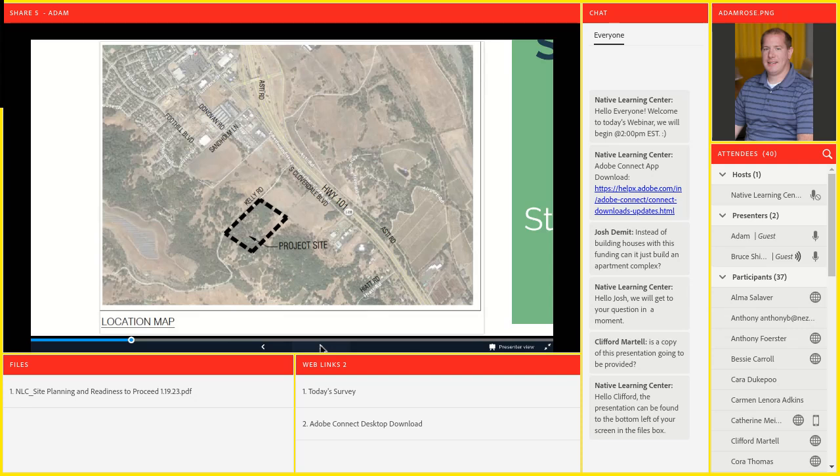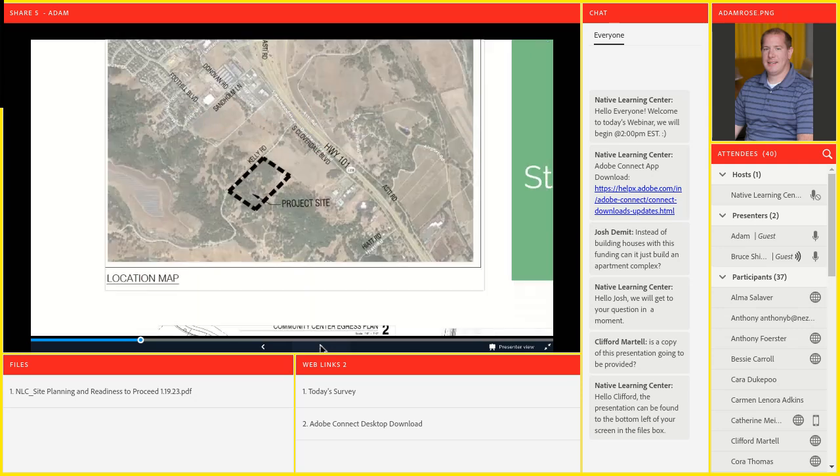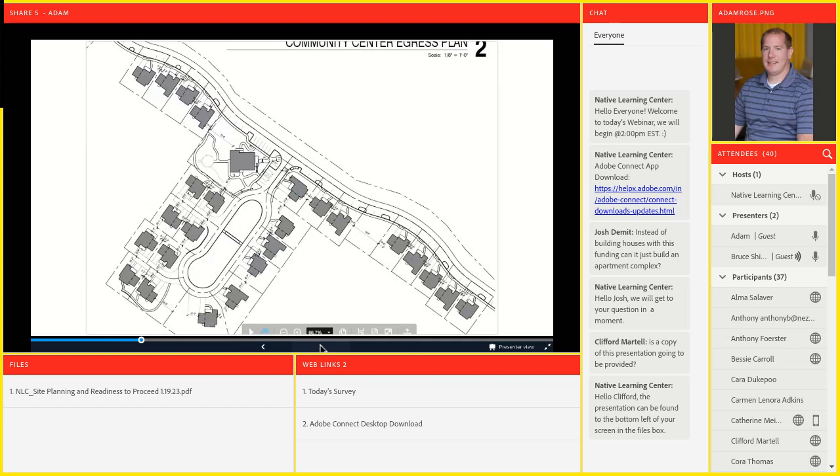And to be able to do a number of units and a potential hotel, they really needed to tie into the city of Cloverdale's water system and wastewater treatment facility. So part of the project is to loop water mains from the city and then to develop a sewer system, which requires a pumping station to take effluent from the southern part of Cloverdale and pump it to the city's wastewater treatment facility, which was key for the development of this site and all the other surrounding properties.